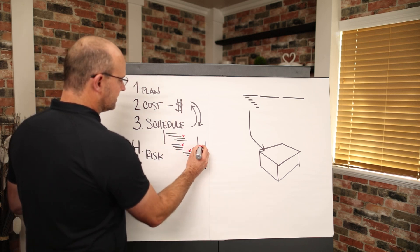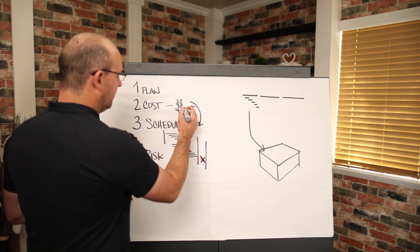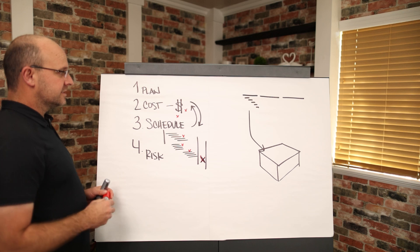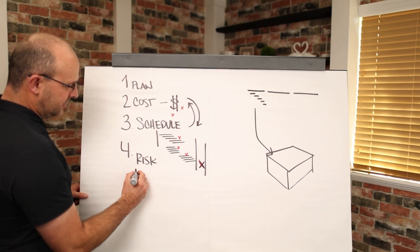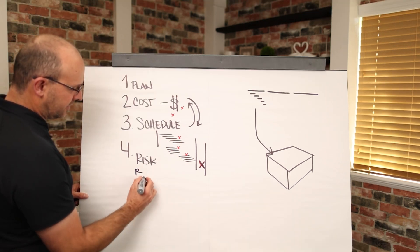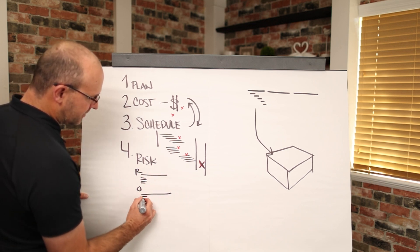And I'm just going to draw these as Xs inside the project plan here and probably some possible risks with cost as well. Definitely. And so what you want to do is you want to keep a risk and opportunity register and write down what are my risks, okay? What are my opportunities, right?